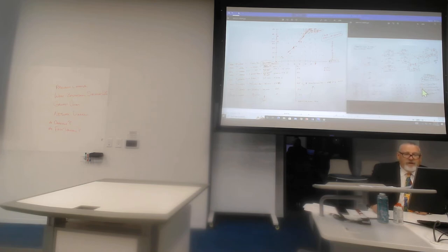But I've got another critical path that's at 26. I have a new critical path. So I can't go A 3 times. I have to crash one of the other things that's in the critical path. Fortunately, the new critical path is 26 weeks, which is A, C, F, J. And we have J appearing in all three of those. So if we were to crash J, we further reduce this critical path by a week, this critical path by a week, and this critical path by a week. So we're down. Does that make sense?